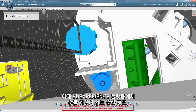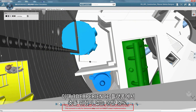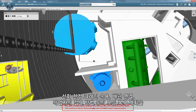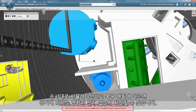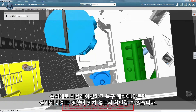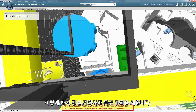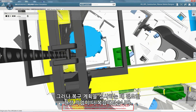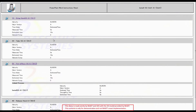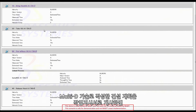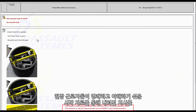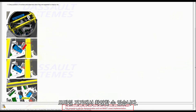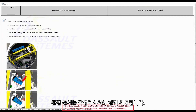We simulate all the sequences of the recovery plan — collision-free carry-in path, operation of the polar cranes, piping tie-in, workers' access, and so on — in the 3DEXPERIENCE platform and confirm that with the recovery plan, the impact on the construction schedule is zero. Now the recovery plan is created by the construction planners. However, field work to perform the recovery plan has become more complex. The construction plan in Multi-D is published as work instructions and field workers can access the instructions provided with clear and understandable visuals on mobile devices. Associated documents are delivered together with the work instructions.